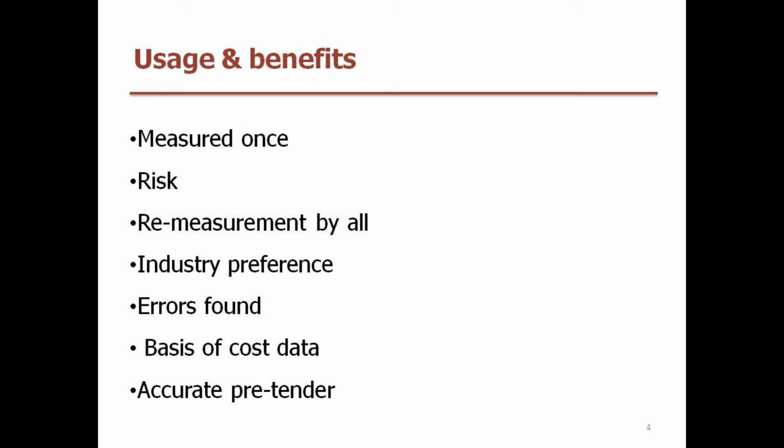And as I said before, it can be used as a basis of cost data, and that's not just in the current project, but also in future projects too, to determine accuracy of future tenders. To also use as a basis of cost data for future estimates as well. And the bill is also an accurate pre-tender, so it's a level playing field for all builders to price and compete on.